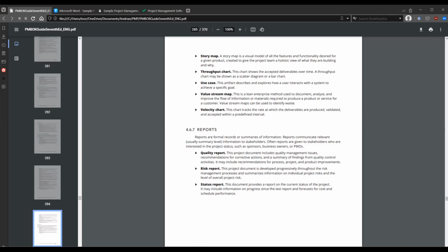As for the structure, I'll give specific examples, but basically you mean to add what's the current status of the project, and usually it's comparison to the project goals, like you have certain goals and how is the project measuring against these goals, what was the progress since last status report, and define next steps or plans for the next reporting period within the project. So usually this is sufficient. More specifically structure, I'll try to share.